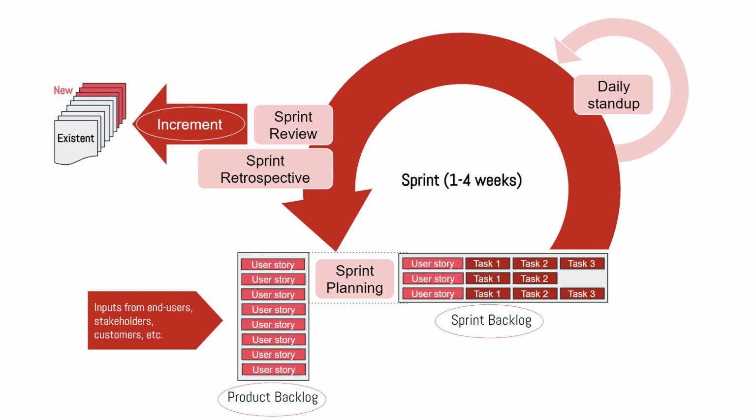During the sprint planning, the Scrum team defines what they are going to work on during the next sprint. And the selected user stories that are going to be tackled during that sprint are called the sprint backlog. And at the end of the sprint, when the development team worked on these user stories, they produced an increment, they produced some outputs which should be workable and should be functional to the end product. So this is the third artifact of Scrum, which is called the increment.